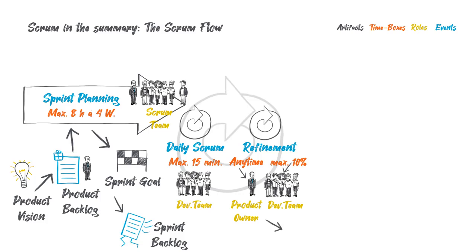The definition of ready helps to sufficiently detail the requirements. Writing requirements is the responsibility of the product owner, but he may also delegate it to the members of the development team. If he does so, the product owner is still accountable. The third phase involves estimating the workload of requirements by the development team. Here, the Scrum Master provides support when it is needed. The effort is estimated using an abstract scale relative to work that has already been done. The processes in refinement prepare the requirements for the next sprints.